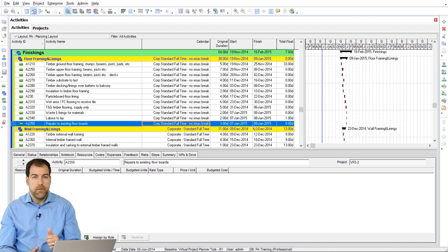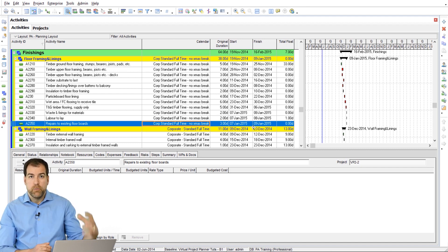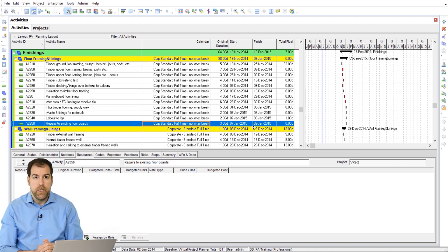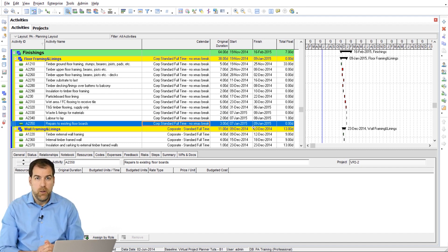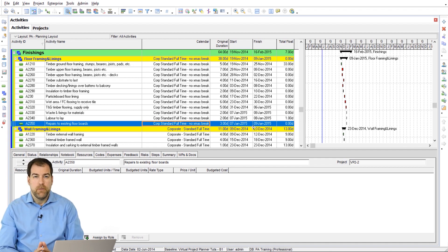So try the F5. Sometimes rescheduling helps because it also refreshes the summary information as well. Or just ignore what you see for calendars on the WBS bars. That's my tip for you today at Ask Plan Academy. I'm Michael. See you later.